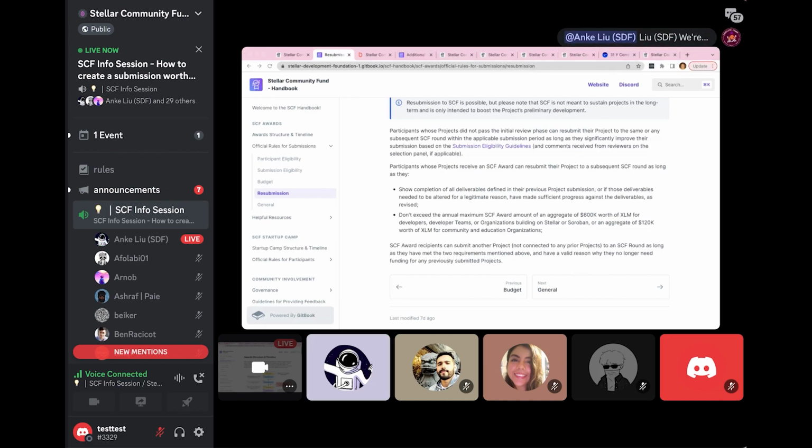Currently, what is Sandbox? Okay. So Julia says we're currently working with Stellar Anchor. Would going from the Sandbox of the Anchor to the actual production environment be considered a good first deliverable, assuming we validate the idea? If it sounds like you can get it done in 2 to 3 weeks, that would be a great first deliverable. Definitely just make sure that it makes sense to the amount of work, the 10% of the total project scope, and that it has an attached budget of 10% of the total project budget.